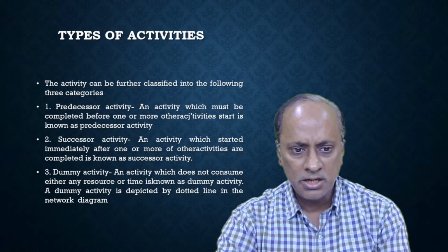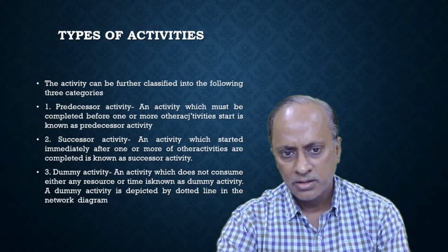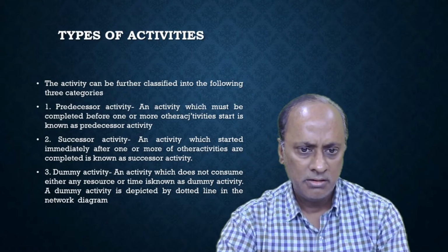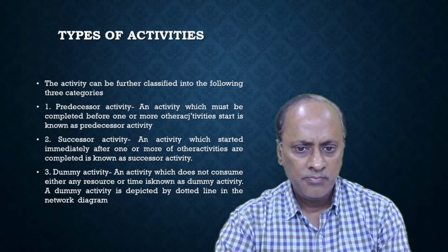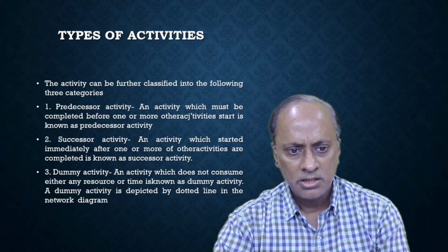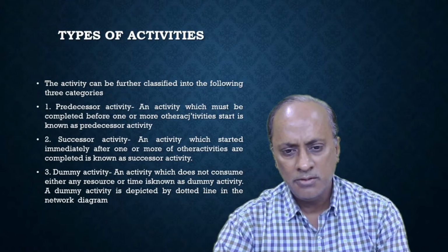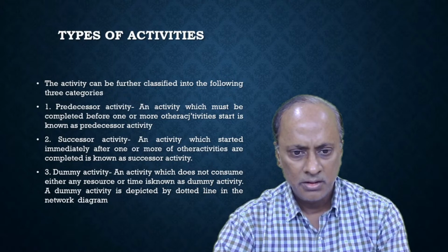An activity which starts immediately after one or more activities are completed is known as a successor activity. The same example we can take: serving tea and preparation of tea. Serving tea is referred to as the successor of preparation of tea, because serving has started immediately after the preparation.